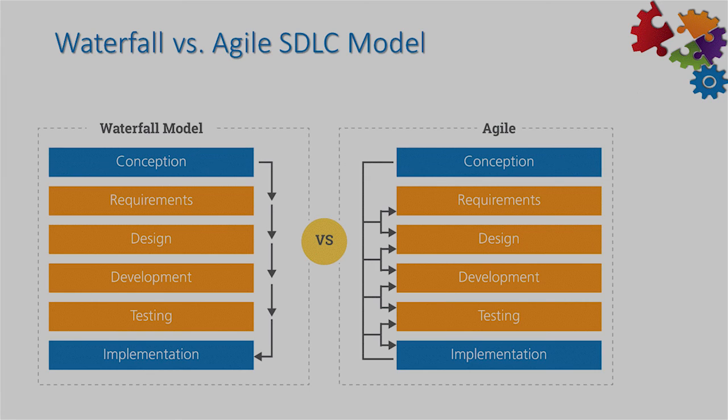So in such a scenario, how then do you choose which model works best for you? The key factor comes down to the context of your project. If you're building a system or a product that is based on the rapidly changing industry today, Agile is probably the way for you to go. If you have rigid requirements that you have a clear understanding for, and you know that it's something that can be set and you know what to expect from your system, Waterfall then is the best methodology. Or better yet, in several scenarios, picking up the processes from both these methodologies and combining them to work for your project would be the best way to go as well.